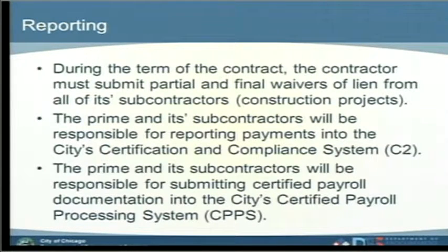The prime reports what he paid the subs, and the sub goes in and acknowledges and confirms that that money is correct. The prime and the subcontractors will also be responsible for submitting certified payroll documentation into the city's certified payroll processing system called the LCP Tracker. That's another reporting tool that we have to track, report, and monitor payroll expenses.